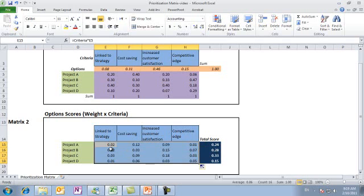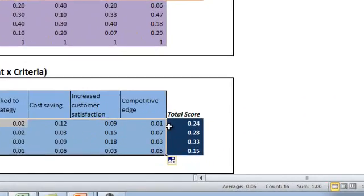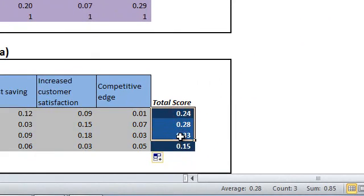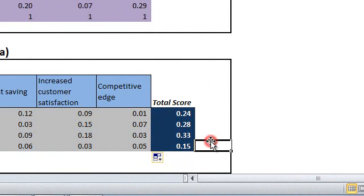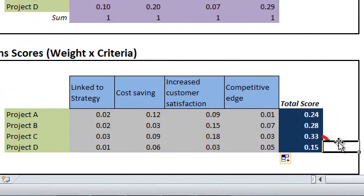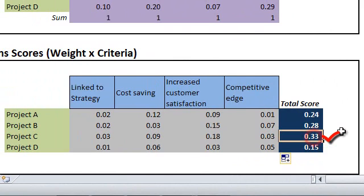The last step left to get your best project is summing up scores for each project, which is shown under the total score column here. This tells us that project C is the best one to initiate since it has the highest score, 0.33, based on the criteria and its performance to this criteria compared to other projects.